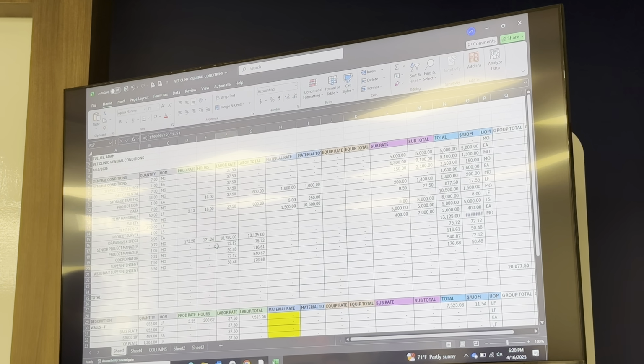So you just changed it to salary divided by 12 times 1.5. Yeah, I really like to stay consistent. If I'm figuring everybody by the hour, I wanna figure every single line item by the hour. But that is gonna really be a complicated formula for everybody to work with, so this is gonna be a lot more straightforward. So this guy's making 150, so now I'm just changing out my salaries again.